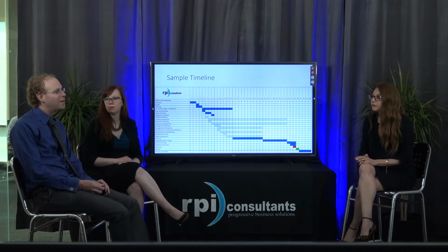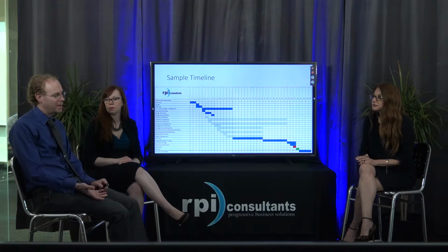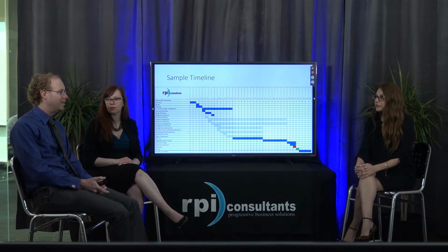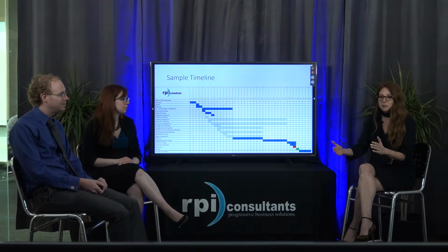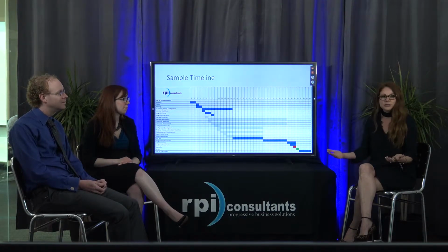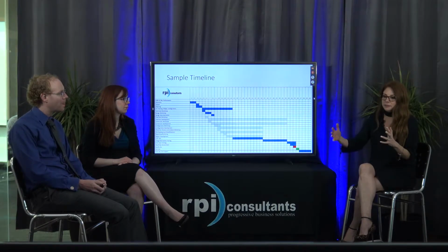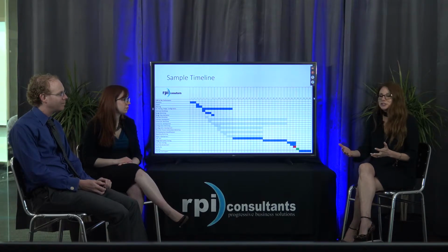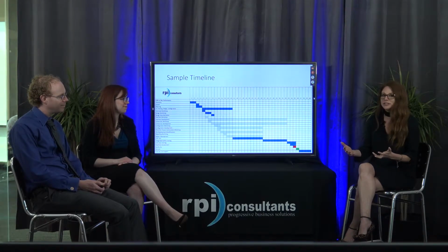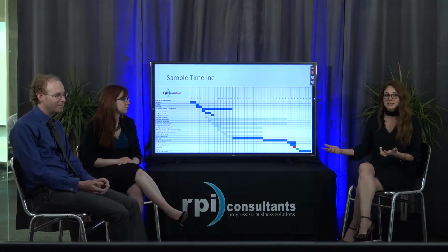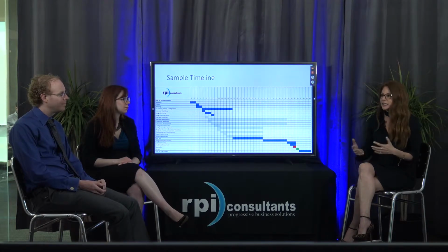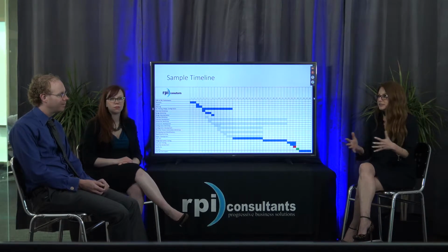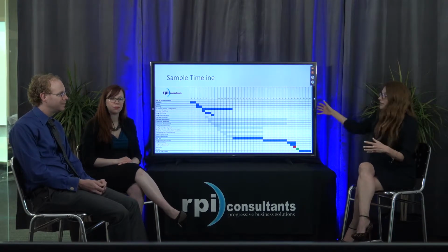Sure. And we know that our customers have certain periods of the year where they can't really participate in project activity. Yeah. In HR, it tends to be October through January. You're kicking off your open enrollment. You're going through year-end. Holidays kind of play in there, as much as you don't really want to say they don't count because it's not really true working blackout periods. We do find it's very hard to have everybody in one room to make design decisions during that month of December. Yeah. So maybe it is a 12.